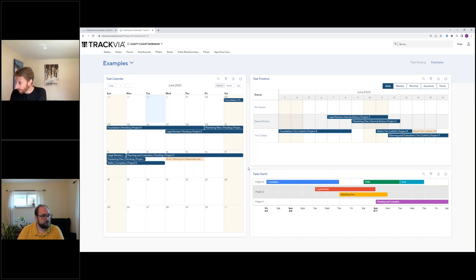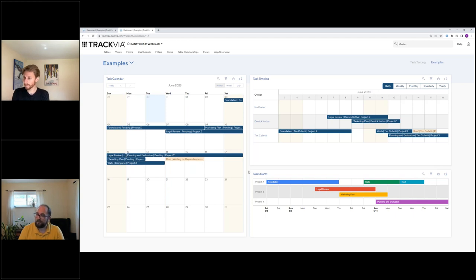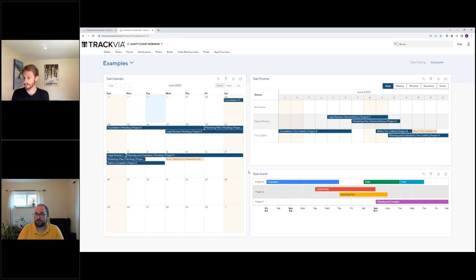Mike asks: if you have a project plan uploaded with dependencies, would you use a script to create the prerequisite child records? Yes — if you're importing from a spreadsheet with comma-separated values showing task dependencies, you could have a script look at those values and, for each item in the list, find that task and set a dependency to it. The key challenge is having machine-readable source data for the script to parse.